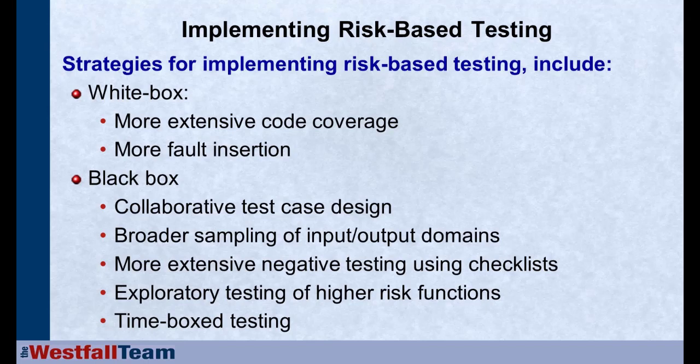I've already mentioned using that exploratory testing for those higher risk features. One of the things that you can do, as I said, was reserve about 10 to 20% of your testing time. And if you are finding defects in a particular area, either in white box integration or black box testing, go ahead and use that as almost a risk buffer and pull time away from that buffer to go do more extensive testing in the areas where you are finding things. In effect, with exploratory testing, you're designing your test cases as you go.